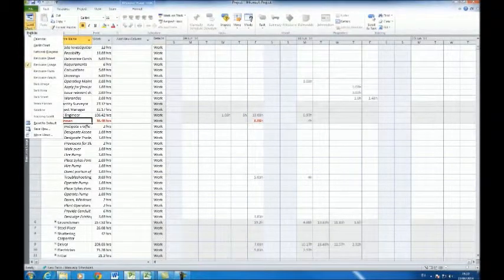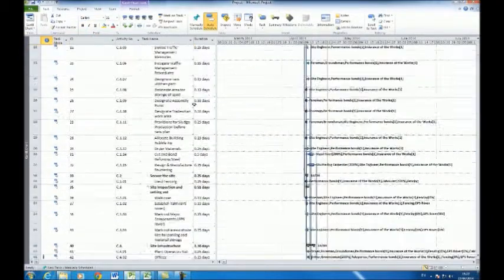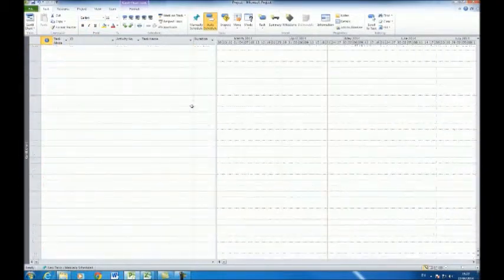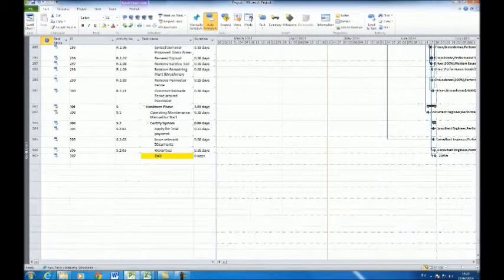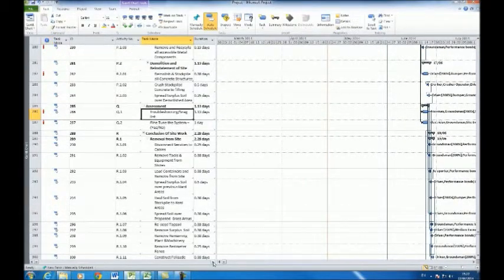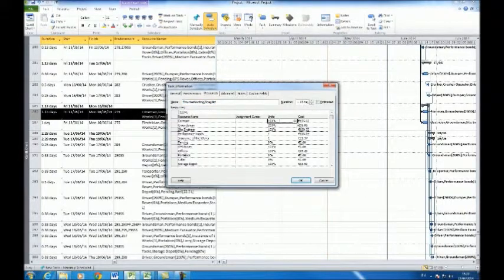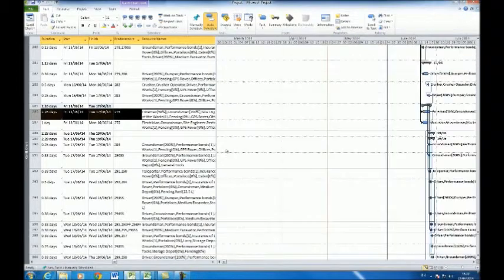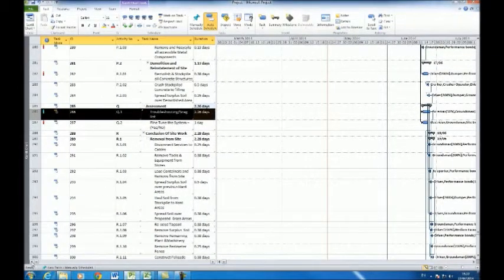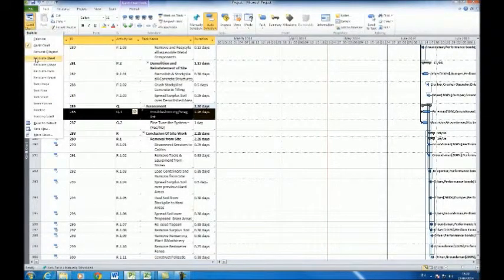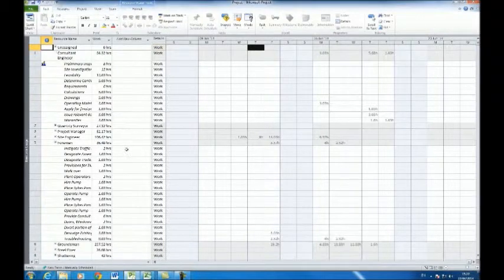From here, select the Gantt chart icon and choose Gantt chart from the drop-down menu. Select the appropriate activity in the task name column, and proceed to click on the relevant cell in the resource name column. Select a different value from the drop-down menu in the units column by changing a resource from 100% to 50%. This allocates a resource to spend half his time on this activity instead of all of it on this activity. In other words, he is free to carry out another activity.